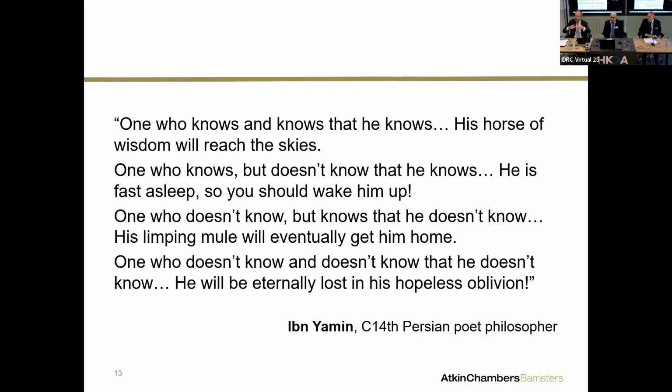So you were given a margin of error. But of course, how much of that is done over time, and how much damage is done in the meantime by constantly letting the fire run away and then bringing it back down again with water, dousing, who knows? But I think in terms of trying to define completion criteria, performance guarantee criteria, you need to be quite careful about expressing what will be the quality of the fuel you're going to put in, because you have this inherent uncertainty.